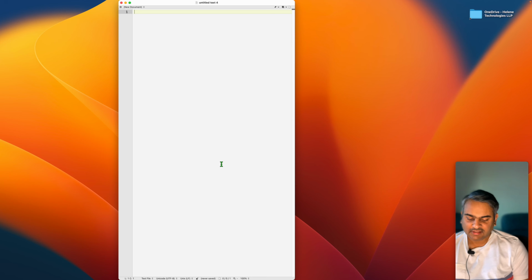So assume there's a simplified team consisting of only one engineer. His productivity is 0.5 tasks a day. That is, on average, he completes half a task in a day or one task every 2 days. And this is average. Some tasks may be done very quickly, maybe in an hour. Some may take a week. But if you average it all, the productivity is 0.5 tasks per day.